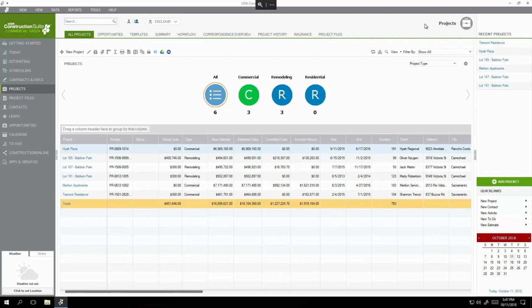And then the last step, hopefully, in all of your workflows will be a project recap where you sit down and discuss anything that might have come up. Again, this is all part of the project management aspect, or the engineering aspect to it. We can go through and review any possible flaws that we had on that project and refine our templates and our workflows to make sure that we account for them next time, so that we can have a better job every single time.